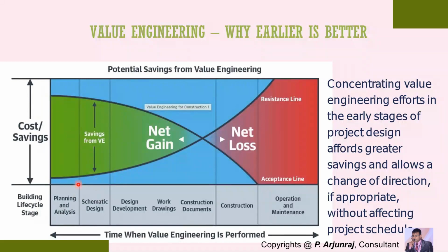The savings from value engineering is much higher during the start. You can see here the savings is higher when you're applying value engineering right from the start of the process. First is the planning and analysis. Next, you go for design, then development, then drawings, documentation, then construction, or construction is nothing but the products.